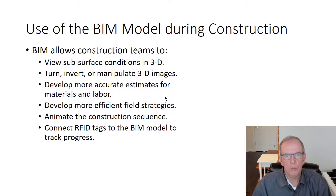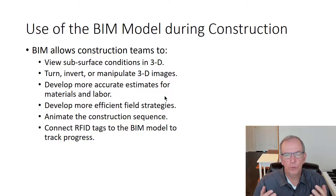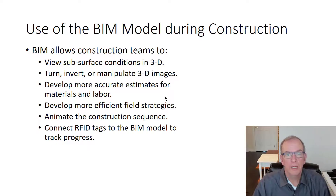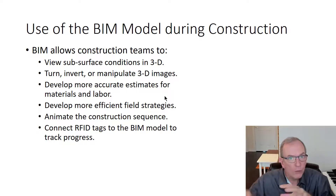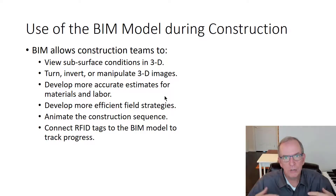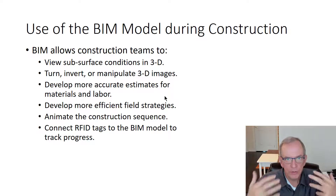They've been learning as they've gone and are well up the curve on this. When they're prefabbing off-site, it's not in the way of other work that's been scheduled. We have what we call the stack effect in construction, where we've got too much going on at one time — it's unsafe, people damage things, it's crowded. You ever tried to paint a room full of furniture? Not easy.